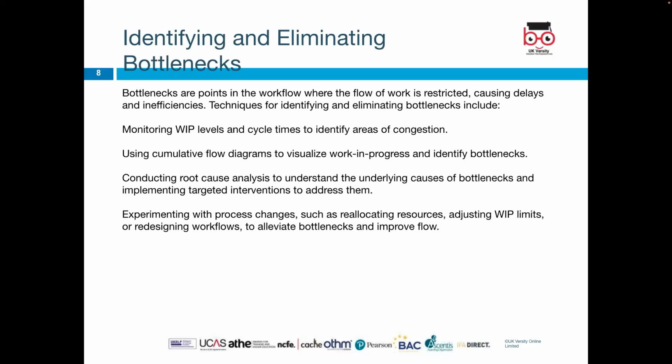Techniques for identifying them include monitoring the work in progress levels and cycle times to identify areas of congestion, using cumulative flow diagrams to visualize work in progress and identify bottlenecks, conducting root cause analysis to understand the underlying cause of bottlenecks, and implementing targeted interventions to address them, experimenting with process changes such as reallocating resources, adjusting work limits,